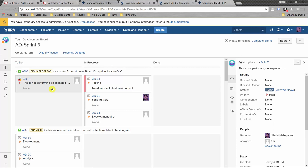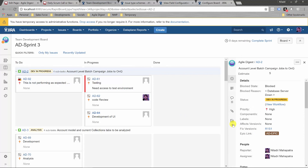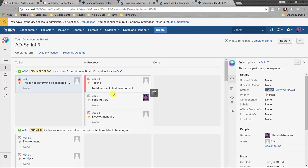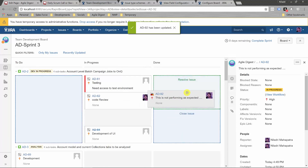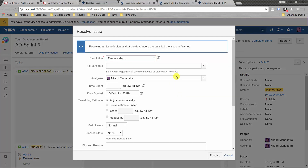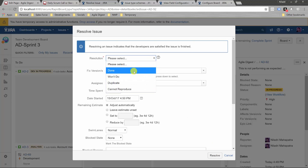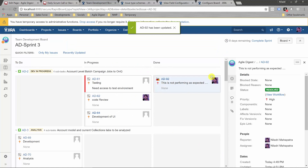Once created, you'll see the defect is in 'to do' status and it will follow the same workflow as subtasks. This way you can create and manage defects, see if the story has all defects completed or not, and manage priorities accordingly. In the subtask area you can see the defect type alongside construction and execution work. Once you start fixing, move it to 'in progress'; once done, resolve it. There's a transition screen configured where you can enter final time spent. I'll mark it as resolved — that's the resolution state.